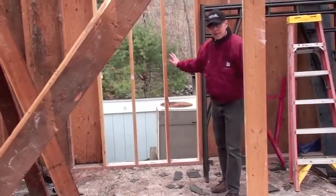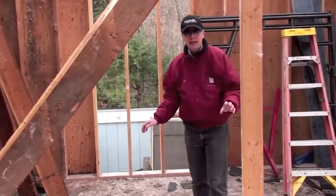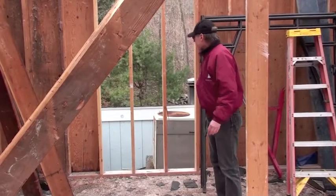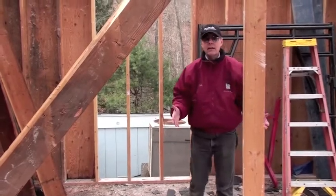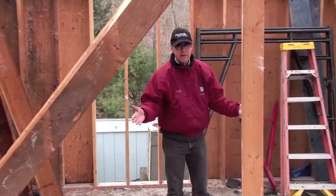That way, once the frame is exposed, we'll get work crews in here with a crane, and we'll cut off sections of the roof, sections of the wall, hoist it down on the ground, where they'll continue dismantling it, stockpiling it, sorting it for reuse in the existing structure. We don't want to just fill our landfills with good, usable material.